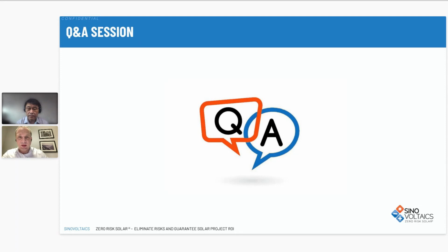All right. Here's another question. It comes from one of the participants, which is, what are the conditions under which the inspection can be executed, like no rain, maximum environmental light, maximum wind force? Rain is definitely a big issue. We are using a DC power supply and electronic equipment that is not waterproof. So as long as there's rain, we stop.